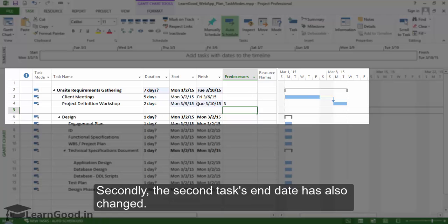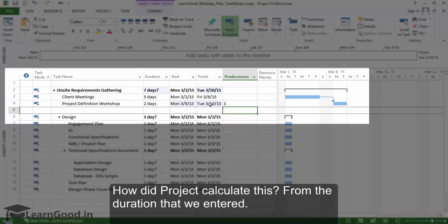Secondly the second task end date also has changed. How did Project calculate this? From the duration that we entered.